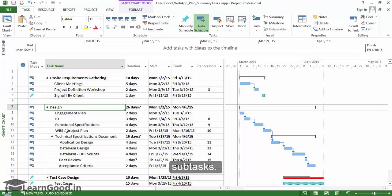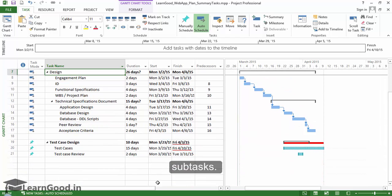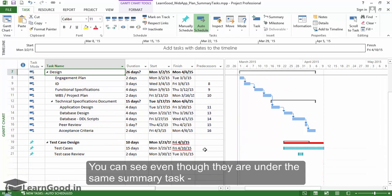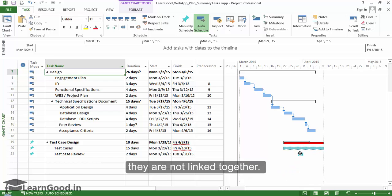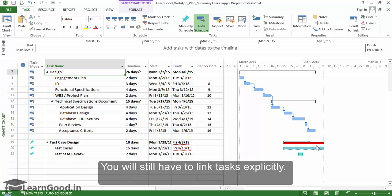You can see this immediately in these two subtasks. Even though they are under the same summary task, they are not linked together. You will still have to link tasks explicitly.